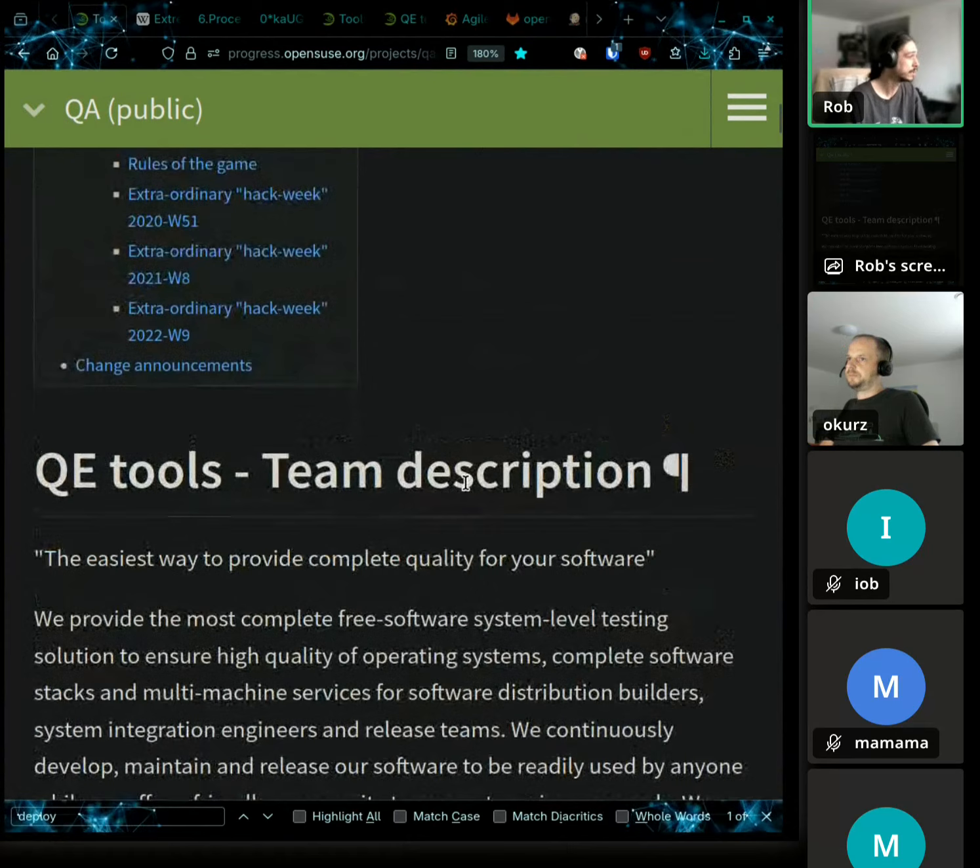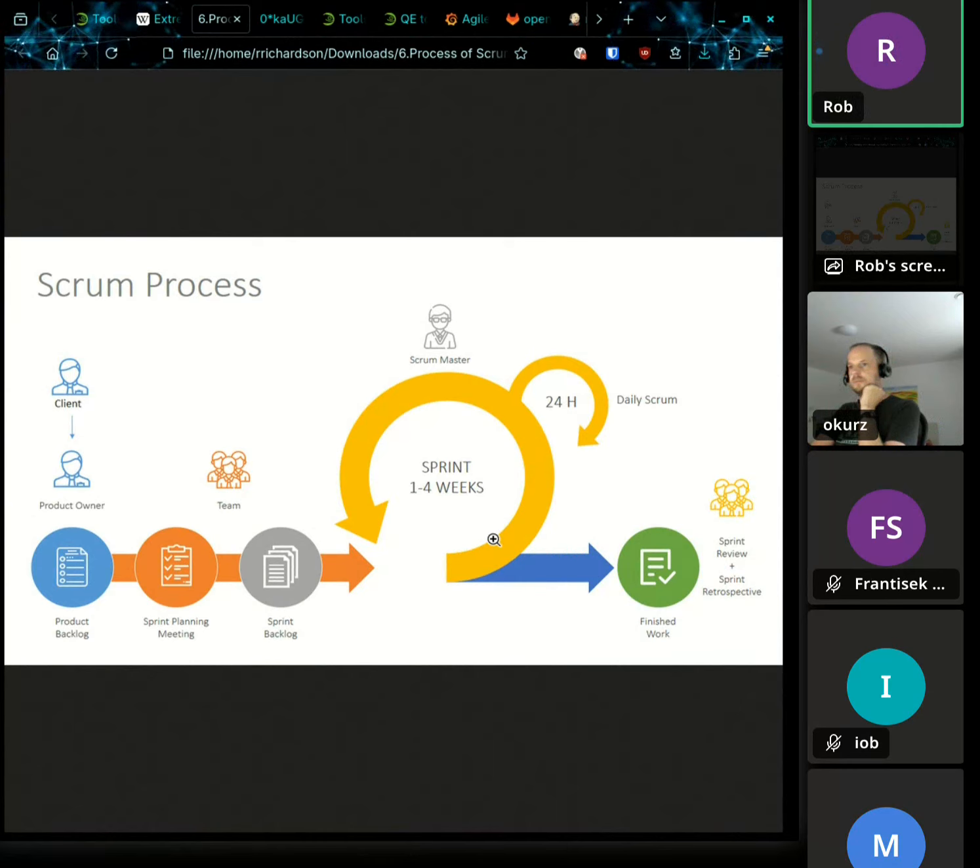to be worked on in a sprint. That sprint usually takes 2 weeks. It can take longer or shorter, depending on the team and their way of working. And in those 1 to 4 weeks, we have regular meetings, like the daily meeting, and we work on those issues in order of priority, and at the end there will be a sprint review meeting, and